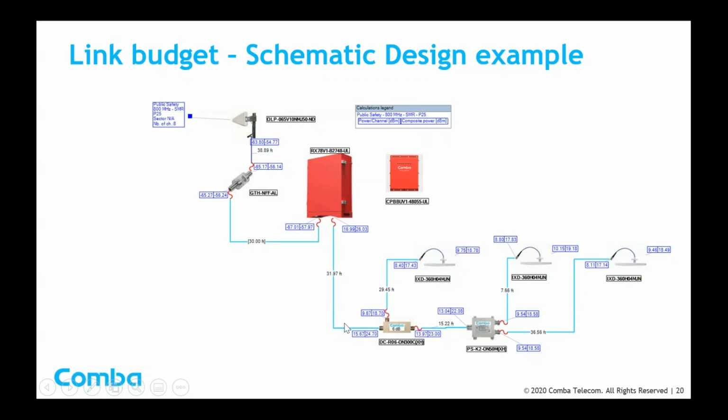So now you see what I was talking about earlier when I said link budgeting. The designer says, okay, I know I've got this much signal coming in, I need to make sure that I have that minimum NFPA 95 out to all these antennas. He has to design and plan for all of this, because everything adds some loss, and this has to be calculated to make sure you get the signal at the antenna that you need.